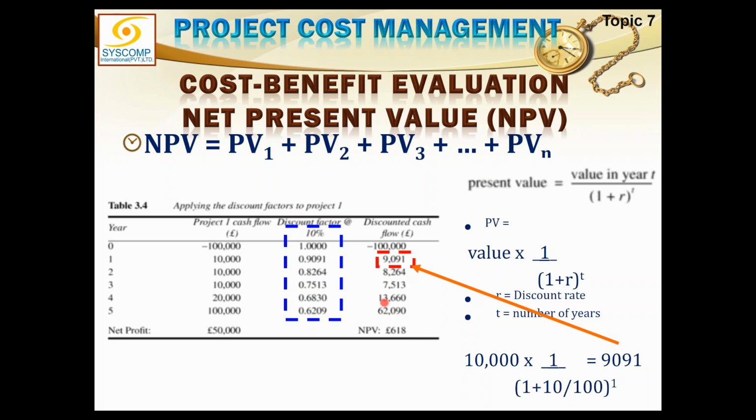So if I subtract it from the present value of today's money, 100,000, no, not 99, it comes out to be 106,180. So if I subtract 100,000 from it, I am still in positive, but the net present value of all these monies over the 5 years would be just 6,180.